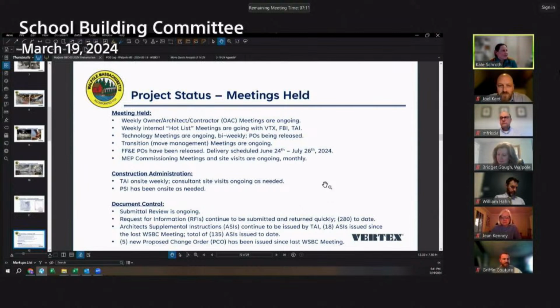All right, looking at the meetings held. The standard meetings, our weekly meetings continue. We have weekly hot list meetings. We have bi-weekly technology meetings as we are in the process of issuing POs for the technology package, and I'll give you an update shortly. Transition move management meetings continue bi-weekly. All the FF&E POs have been released and the delivery dates are confirmed for June 24th through July 26th. MAP commissioning meetings are ongoing and they have monthly site visits. In terms of construction administration, TAPE is on site weekly and the consultants are out as needed. Our third-party testing agency, PSI, is also out as needed. In terms of document control, submittal review is ongoing, requests for information continue, architect supplemental instructions continue. We've had 135 to date, and we have 5 new PCOs.